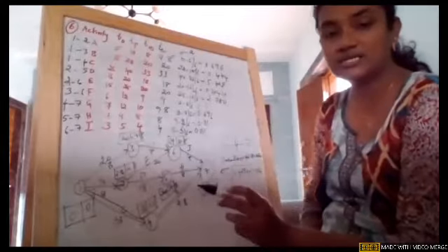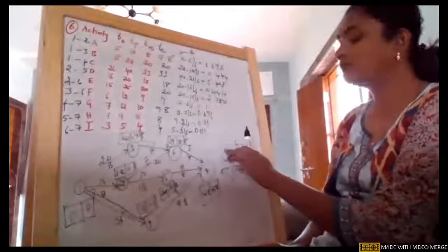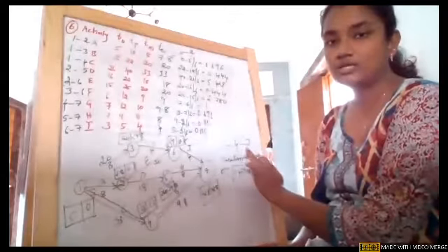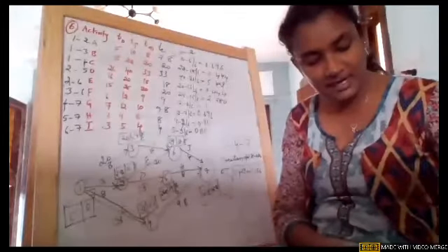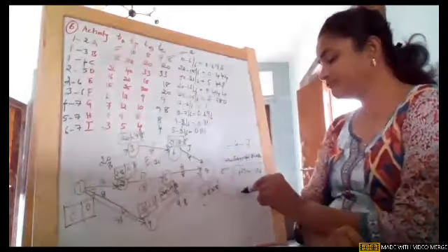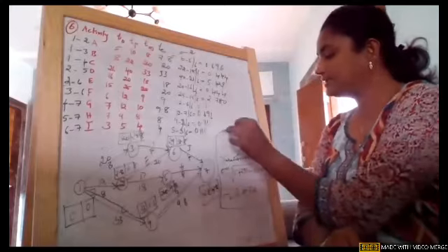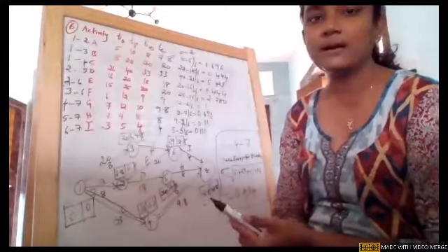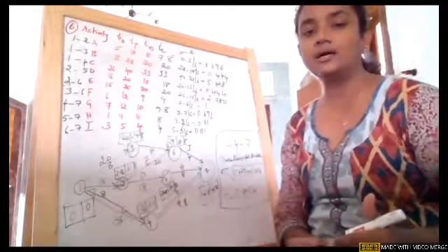We need to calculate sigma. So sigma is equal to under root of the variance of these two activities, which I picked from the calculated value. When we do it, we got the sigma value to be 2.474. Every time when you're writing the critical path in PERT, don't forget to complete this particular process. Okay? Am I clear? Any doubt till here, girls?